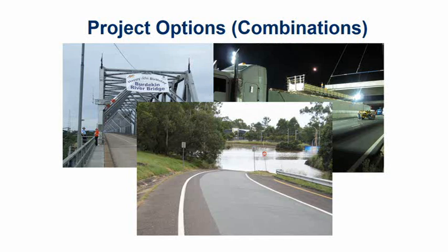This was interesting because there were a few options that looked at just upgrading the road to improve flood immunity, whereas there were bigger ones that created a whole diversion, diverting traffic to bypass this bridge altogether, allowing complete flood immunity and also higher speeds because you're avoiding the towns along that section of road. So it was about 8 or 9 combinations, and we looked at the benefit cost ratios for those, and of course the incremental benefit cost ratios to compare the options. The net present values were also calculated, and many academics advise the use of net present value as a comparison between options, so we had that in there as well. I think we also had the incremental net benefit investment ratio, so you had a few of those results in there.